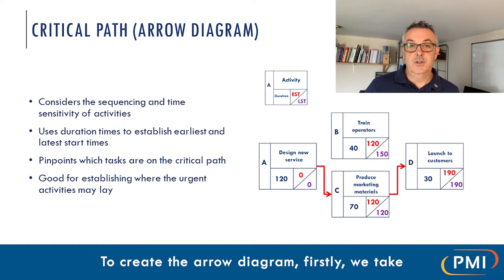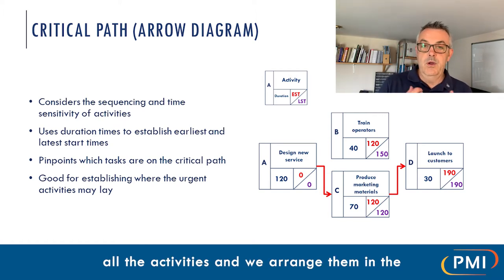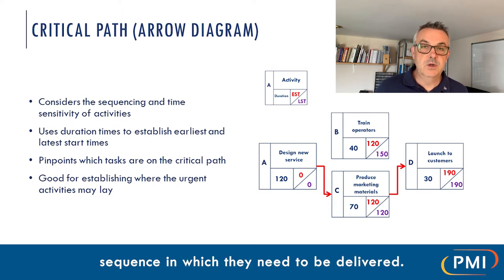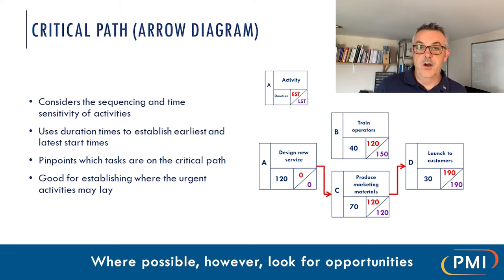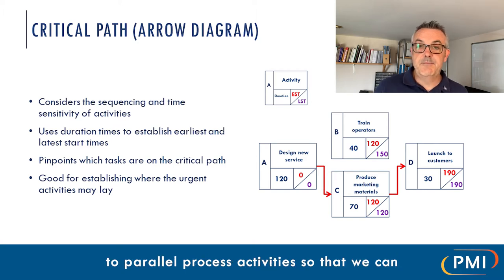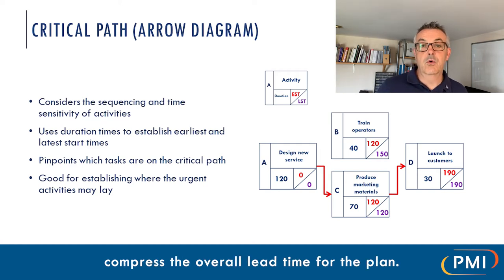To create the Arrow diagram, first we take all the activities and arrange them in the sequence in which they need to be delivered. Where possible, however, look for opportunities to parallel process activities so that we can compress the overall lead time for the plan.